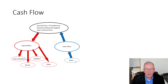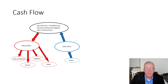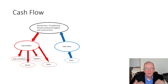Cash inflow often comes from a single source — a particular client — and if that source is unable to pay you, you could be in a cash crunch. We have to manage that as a business and have cushions in place, because sometimes a client runs into their own cash flow problem and can't pay you. This creates a ripple effect: you can't pay your subcontractors, and they can't pay their employees — a cascading effect similar to the financial crisis of 2008.